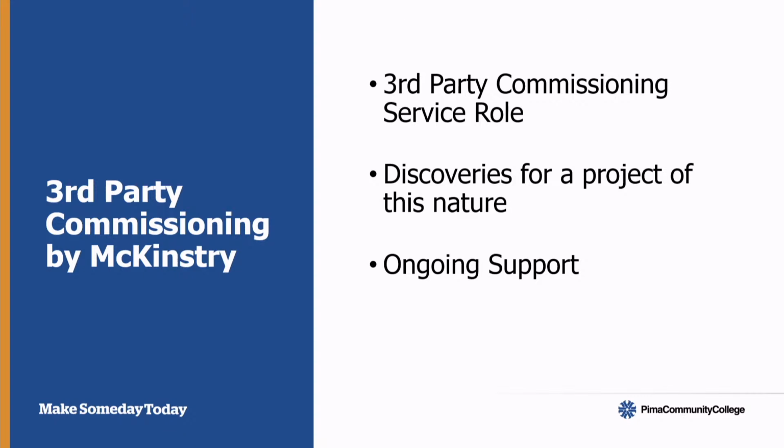Of those 313, we're now down to 3, and they're in progress of being finalized and completed. While McKinstry did provide this for us to get us to this point, there also is ongoing service that's going to happen for the college, where they're going to provide warranty reviews on outstanding items, and they're also going to be providing measurement and verification of our energy savings that are required per the contract. With us tonight is Mike Swift with McKinstry, so if needed to answer questions at the end of the presentation, he's here. With that, I'm going to pass the next run of slides over to David Clark, who is the director of our infrastructure here.